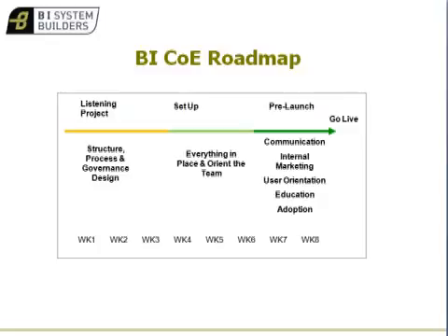But the principles are good. Start with a listening project. Go talk to the business. Find out what will work within your business. Find out what analytics and what data is required. Having completed the listening project, then go on to think about structure, process, governance. That will all determine how you design exactly the nature of your COE framework. Once you've thought that through, go into setup phase.